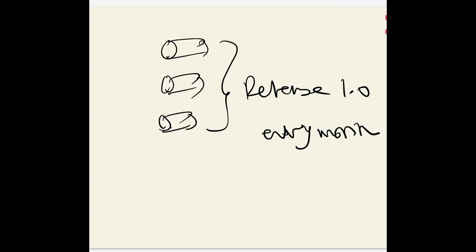Once those sprints are complete, you need to decide how many sprints you need to complete before you can release into production or a shippable product. If the team decides that every three completed sprints we need to make a release, then you can do that. This could be every month, every two months, every quarter. That's what you do when you're given a situation that's not agile in the beginning but you make it agile.